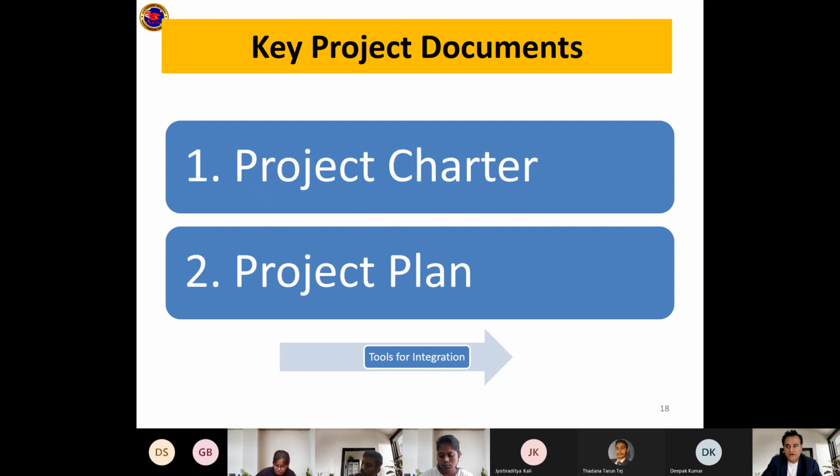Now, the project charter, I mentioned, is in the initiation stage. For a concept to be signed off, you use an overarching broad proposal, if I may say so. And the project plan is after the charter is signed, when you prepare a detailed plan of how you will implement or execute. The project plan will have at least 10 different sections, one for each of the 10 functions. The project charter is a summary of the entire project in 2 or 3 pages.